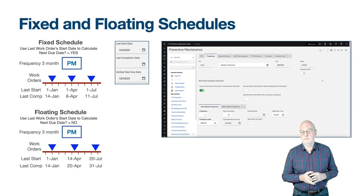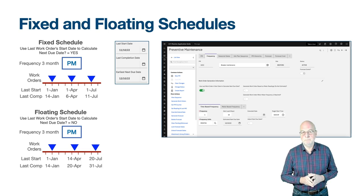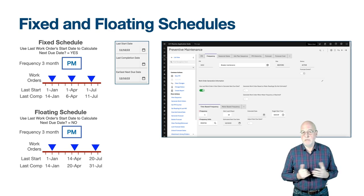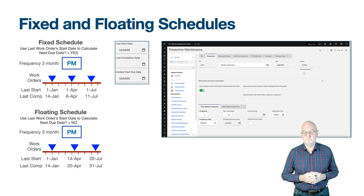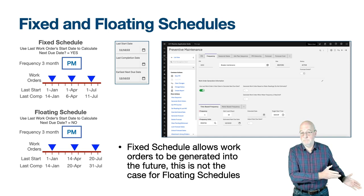As a floating schedule waits for you to complete the previous work order, you cannot generate work orders more than the frequency ahead of time. While there is still an open work order for the PM, you will receive error message BMXAA3191E: PM IC11460 is not due yet, or it does not fall within the active season. For a fixed schedule, you can generate work orders into the future, though this is not good practice.